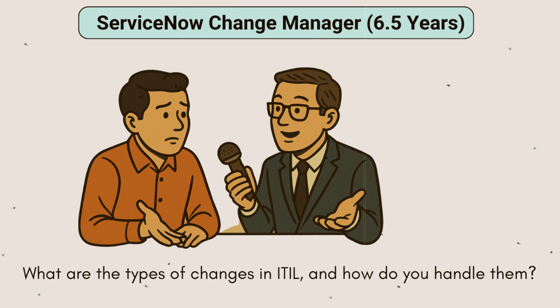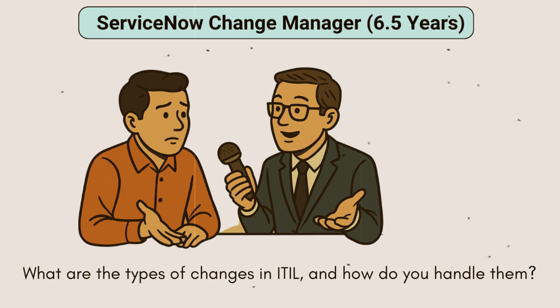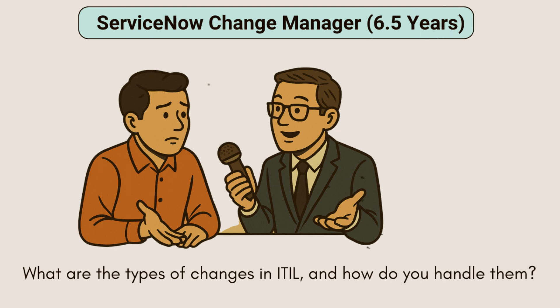Then we have the last type which is emergency change. These are the high priority changes and they need to be fixed immediately because they have been created from an incident. These high priority changes are needed to fix something urgent like a production outage or security vulnerability. They are implemented quickly but must be reviewed afterward by the CAB. So these are the types of changes we have.